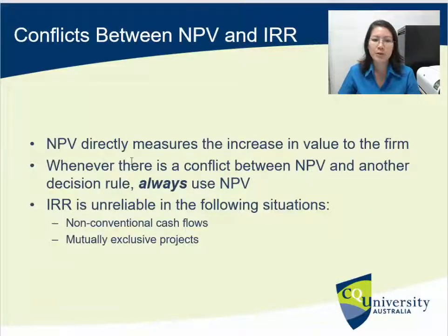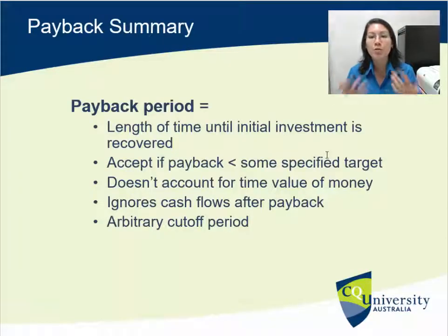When there is conflict between net present value and internal rate of return, always use net present value because it directly measures the increase in value to a firm. And also internal rate of return is unreliable with non-conventional cash flows and mutually exclusive projects, as we just saw. So just a quick summary before we go on to show you your assessment.